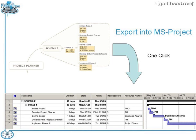I've been able to assign PMO resources, project management resources, business analysts, and the entire project team against individual nodes in the mind map. Then with just one click, I'm able to export that immediately into Microsoft Project. From there, I would do more resource leveling and more detailed project-level tuning in the work breakdown structure definition.